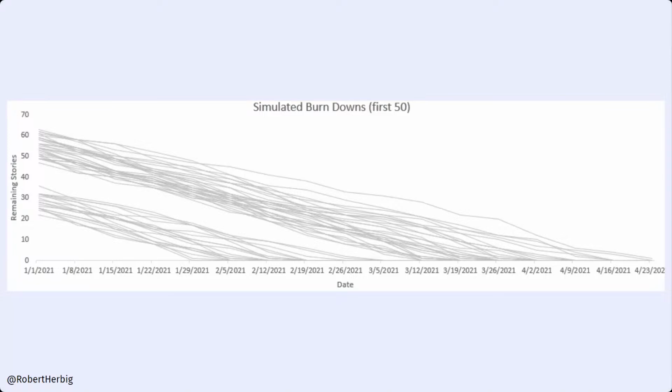And here's the clear impact. Rather than trying to communicate, well, it could be delivered anytime from 129 all the way to 423, which is a really wide range, and I think in this case our business stakeholders would not be happy with it, we can have a better conversation. Well, this risk is the linchpin, and our range is instead 129 to 135 or 312 to 423. And suddenly the differences become quite apparent.